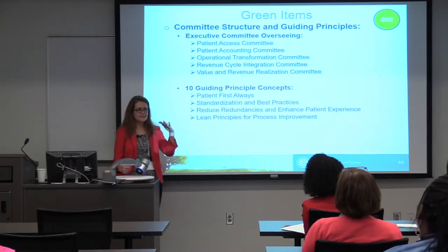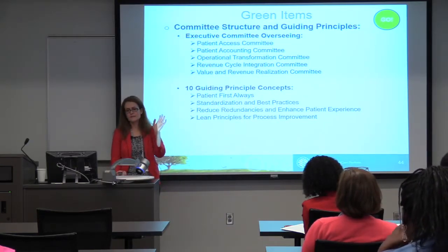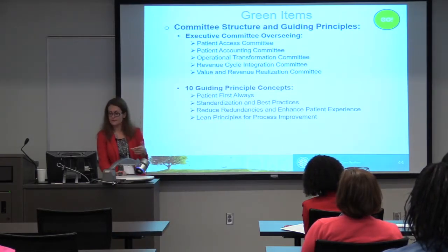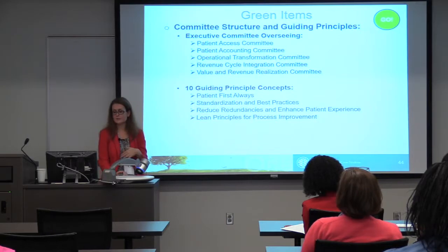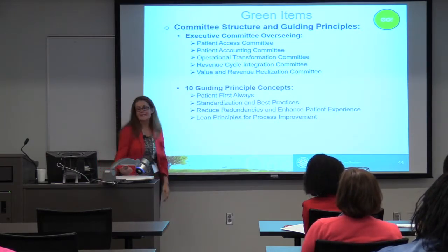We have an executive committee that's overseeing the entire project. And there are subcommittees underneath that executive committee: patient access, patient accounting, operational transformation, revenue cycle integration, and value and revenue realization. I can never say it. We call it VR squared for short.